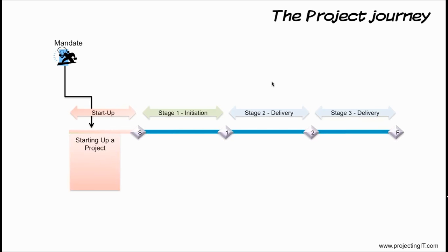Starting up a project, we'll put up a business case that defines the purpose of doing this project. The business case defines the reasons, the solutions, the time scale, cost, benefit, and major risks that can affect the viability of the project. All this information is captured in the project brief. Once the project brief is available, the project manager will go to the project board. Recall that the project board comprises the executive, senior user, and senior supplier. The project board uses the directing a project process.